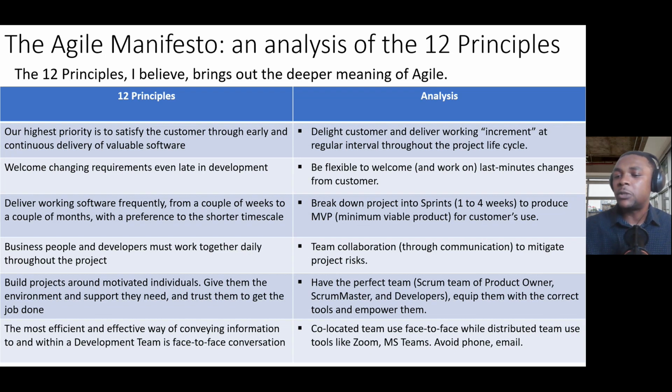on the second day of the second week of the sprint, the customer came and requested to have a new requirement added to that particular sprint. There was some kind of resistance from my developers, but I first had a discussion with the product owner, the PO, to understand whether it was necessary or important to add that to the current sprint. Realizing that it was necessary, I then discussed with my developers, and I realized that it was also necessary. These guys have committed themselves.